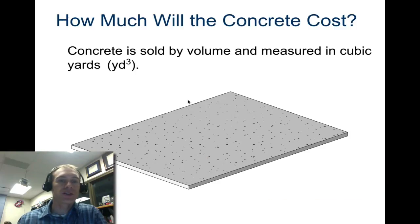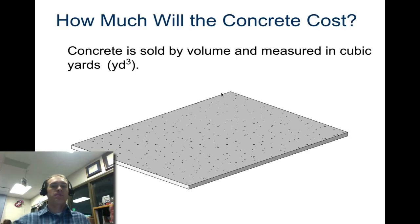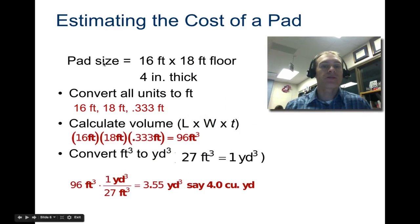What we're going to do in this project is determine how much our concrete is going to cost. Concrete is always sold by volume and measured in cubic yards - three feet by three feet by three feet deep. That's the number you would use when you're buying concrete. If you're going to estimate the cost of a pad, and your pad size is 16 feet by 18 feet and four inches thick, the first thing you do is convert all units into feet. This might be a good slide to screenshot and add to your notes because it shows all the steps you need to do.